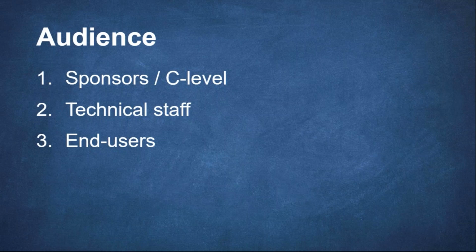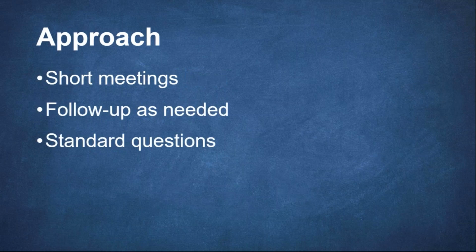And end users ideally give us their pain points, day-to-day work patterns, stuff like that. At the end, we go back to the project team, review the feedback from each one of the different groups that we've interviewed, and put together a picture that is both high level where it needs to be, and then it gets down into specific items, as we've gathered from the end users.